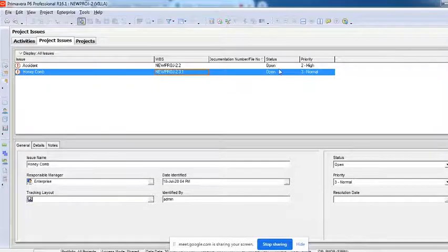The next column is called status. Here when you pop down this, there are three statuses. Either the issue is open, on hold, or closed. You understand what is open, you understand what is closed, right? Open means the issue is still going on, closed means the issue is completed. On hold status is: the issue is there, but right now I do not want to resolve it.